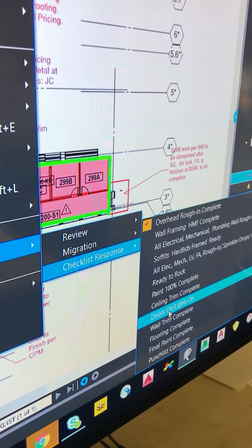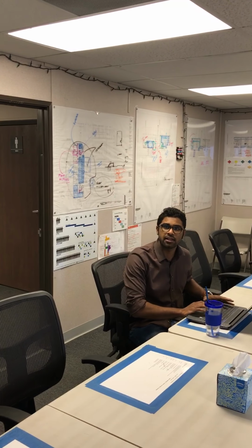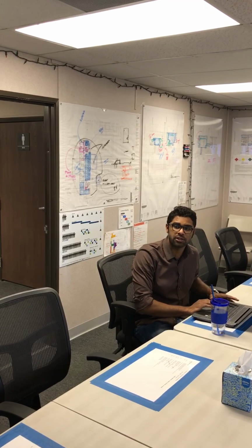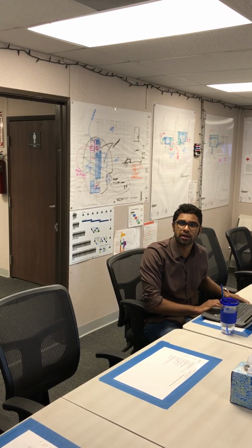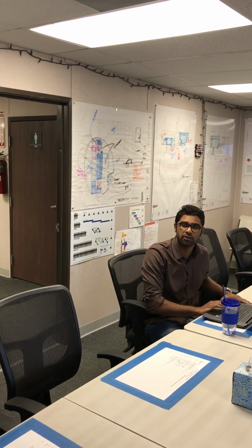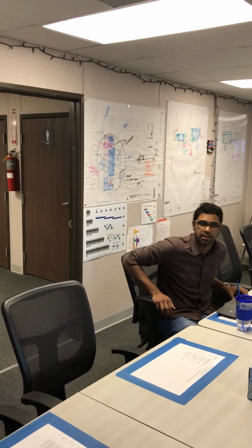And when this is seen by the team that is coming into that room from the next week, they can see the present status this week, and they can proceed to mobilize their crew to those rooms. That's the intent of having these color-coded statuses.